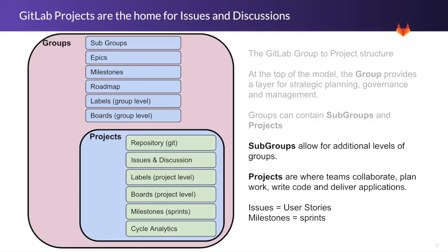When we're talking Agile and the way that GitLab names things inside of our tool, we call user stories issues. For people that are familiar with issues already, you could just keep moving along with issues. But some people are familiar with user stories; we call that an issue. Again, reiterating what I said earlier about milestones, this is something that you can use to build out a time box. In this particular case, if we're doing Scrum, we built out sprints using that milestone capability.